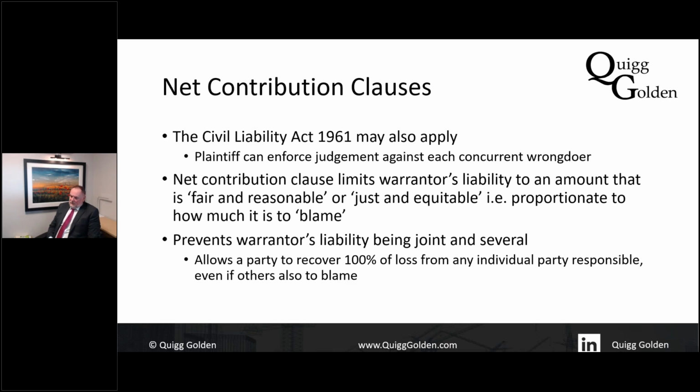And it might be that if all three parties were in existence, and the court was dealing with a claim for breach of contract by all three, they might proportion liability a third, a third, a third, or 60%, 20%, 20%, or in what proportion they believe is correct. But of course, if one of the parties isn't there anymore, because they've become insolvent, they can't go a third, a third, a third. They're going to have to split it 50-50 between the two parties which are left.